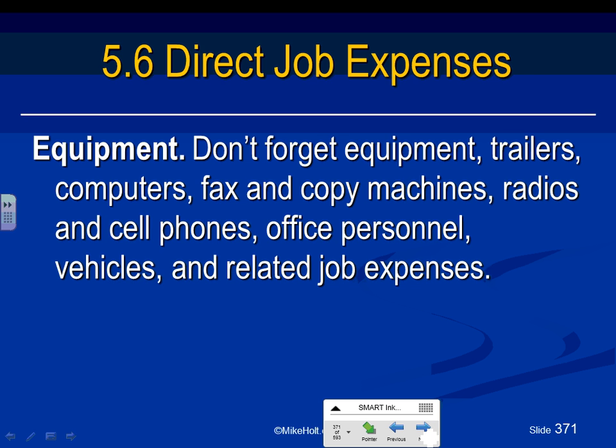Equipment, like trailers, computers, fax, copy machines, radios, cell phones, office personnel, vehicles, related job expenses. Now you guys are managing a business. Can you see that? It's not just taking a couple of conduits and calling it a day. As a good project manager, this should be in the back of your mind. A lot of people, guys, based on their history, like your dad probably will say, okay, based on my history, from A to Z, I'm going to add 10% because I know, if I've done it.